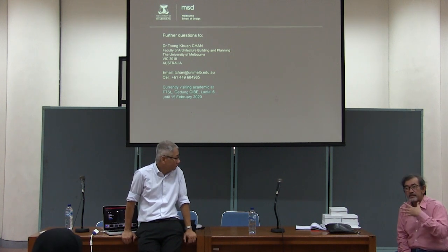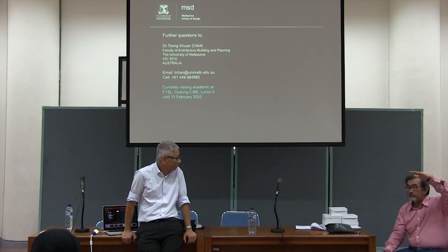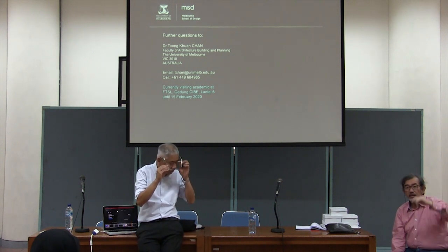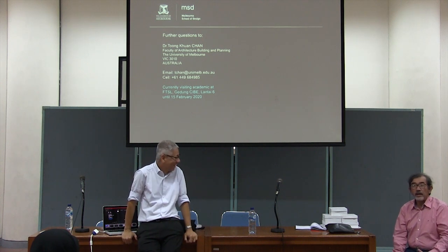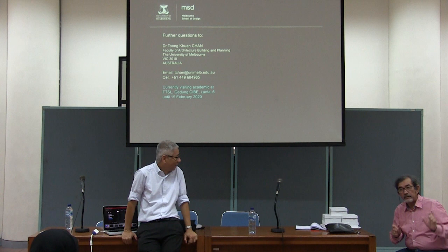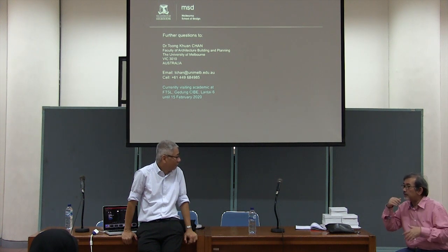So my experience in Bukit Asam at that time, we needed an HB beam of 1 meter and 120 meter. Krakatau still cannot do that. Because there is a government policy to buy from local sources.